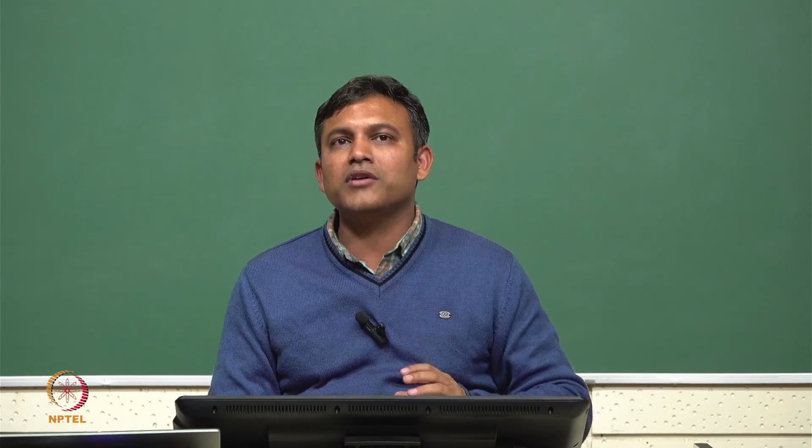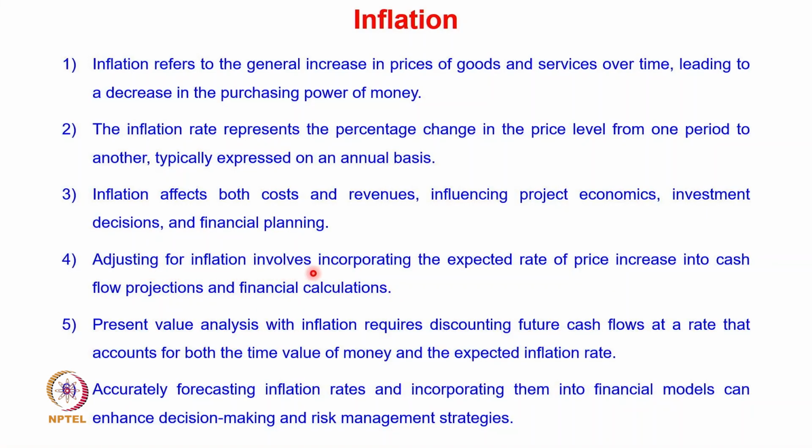So the good idea is to include the inflation in the cost calculation, and based on that we can see whether the particular project is financially viable or not. So you can see that adjusting for the inflation involves incorporating the expected rate of price increase into the cash flow projections and financial calculation in the future. Okay. Again, the present value analysis.